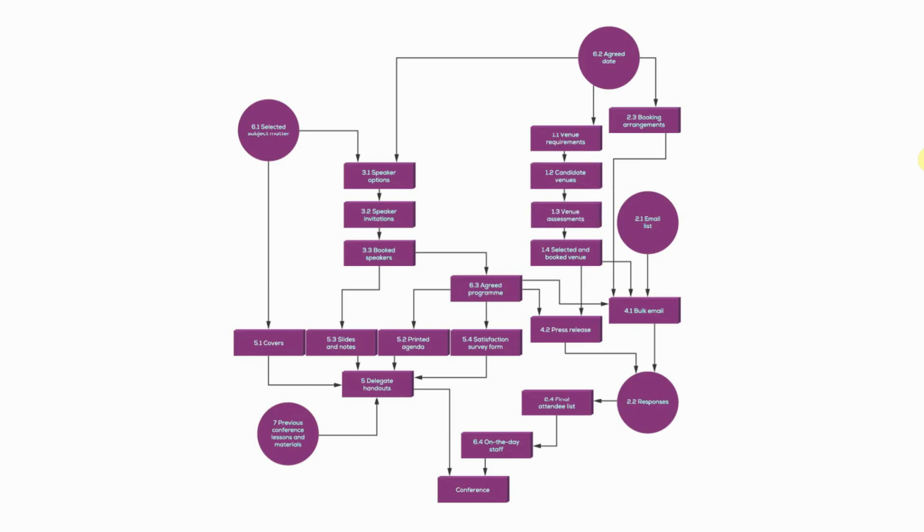Then we carry out the venue assessments. So there'll be documents created that assess each venue. And then finally, we end up with a selected and booked venue. That will allow us to send the bulk email, but we can't send the bulk email until we have the email list. We can't send the bulk email until we have the booking arrangements finalized, and we can't send the bulk email until the agreed program is in place.